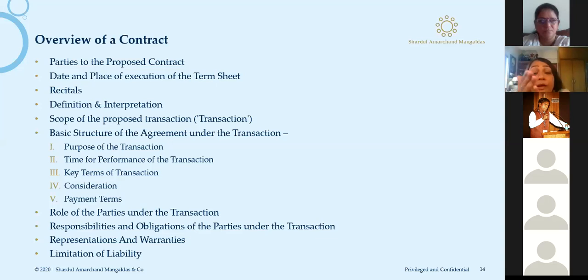Whether he's available or not, unless of course you have a force majeure condition, and you cannot do it because of death, incapacitation, or the flights themselves are not running, or something of that sort. So you need to understand the responsibilities of the company. Responsibilities of the company become very important, because this is what goes to determine the breach of contract.